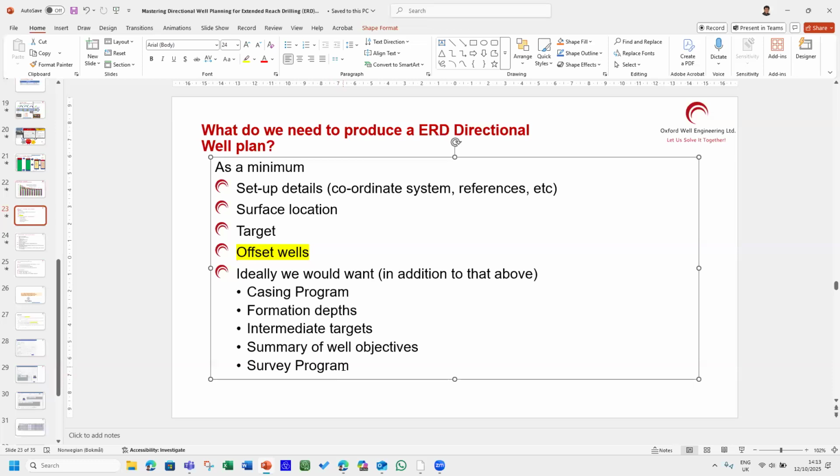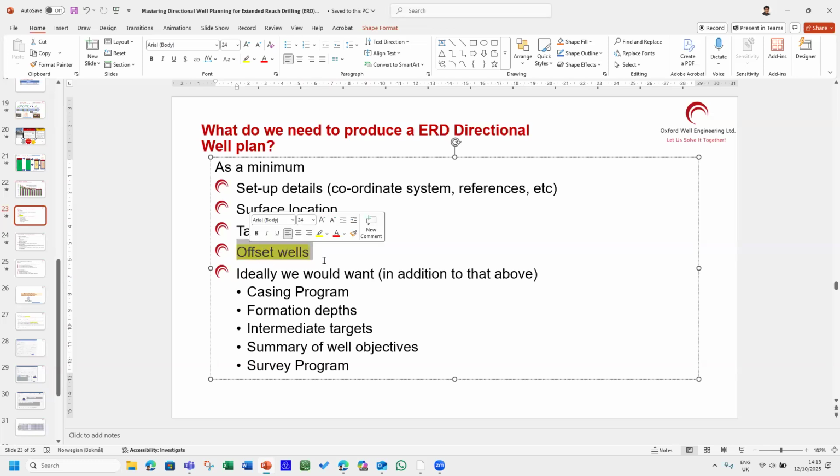There are QA QC forms available. If you don't have it, ask me, I will provide. That way, with dates and everything, people sign off that, is this the final target? Somebody will say, yes, you have an email to back it up. Offset wells, ask them for the top and bottom lines of the offset wells, the whole surveys, and make sure yours matches with those. And you get it as sign off.